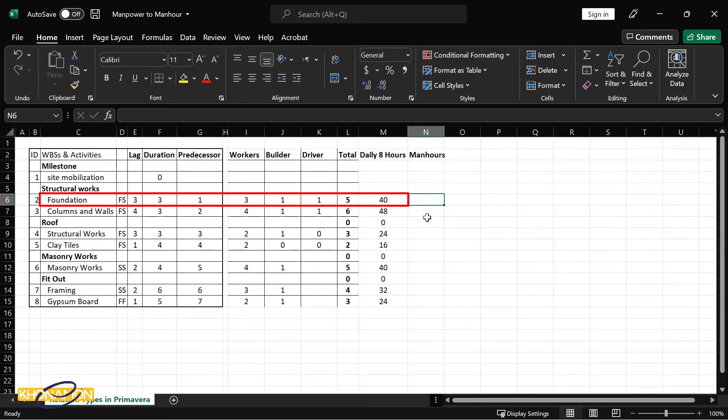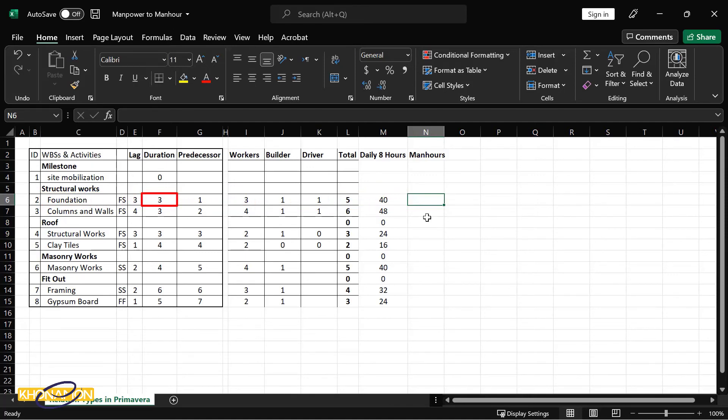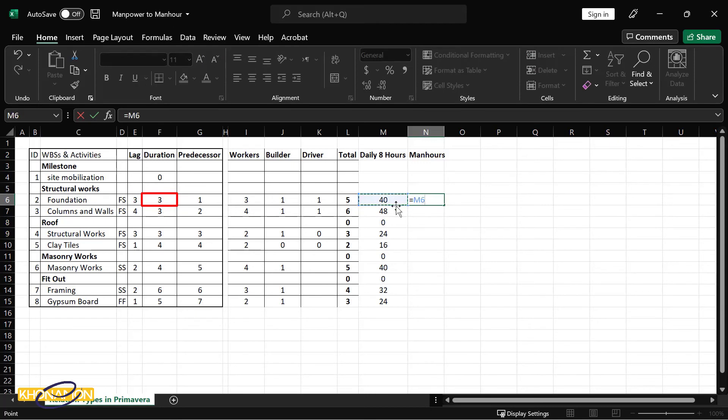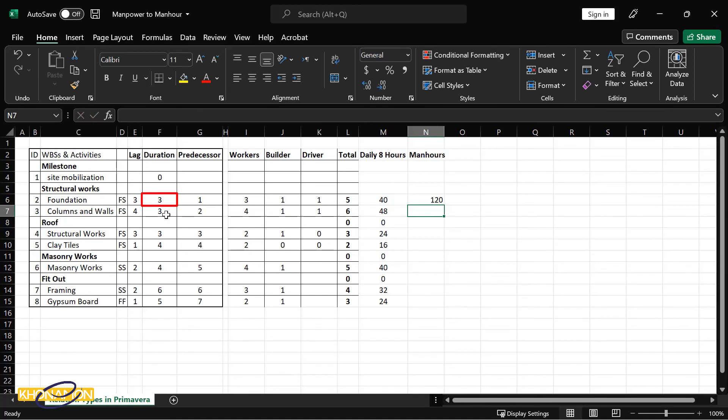This is the way of calculating manhour from manpower, and this is the daily manhour. Here we have the duration. It is written three. So if I multiply 40 by three, I get 120. This 120 is the total manhour of the foundation activity.